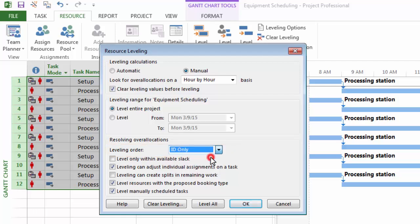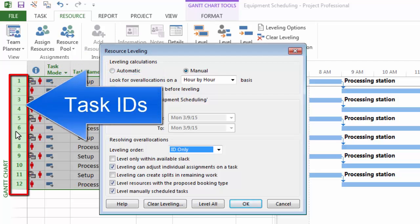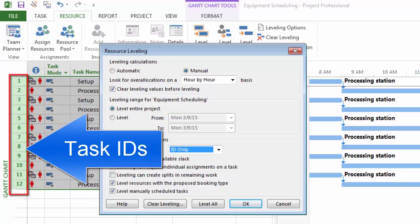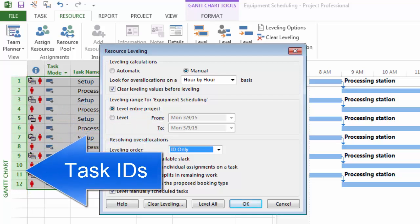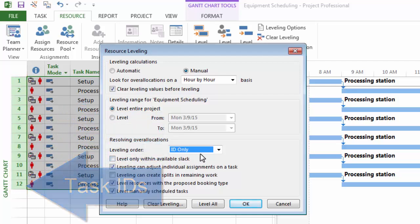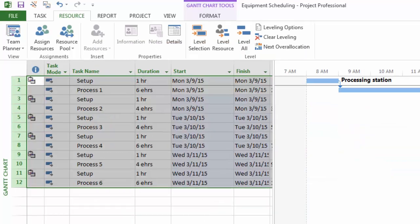And here's the important part. I need to select for the leveling order ID only instead of standard. I'm going to select ID only, and that means that leveling will be based on the task ID, which is one, two, three, four, five, our row numbers. They're called task IDs. So that is important part. Now I'm going to click on level all and see what happens.